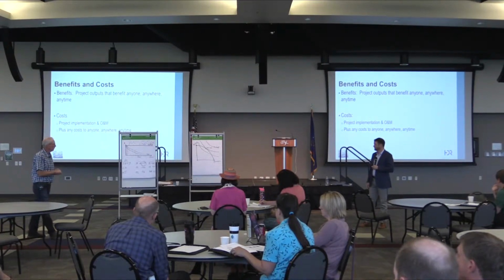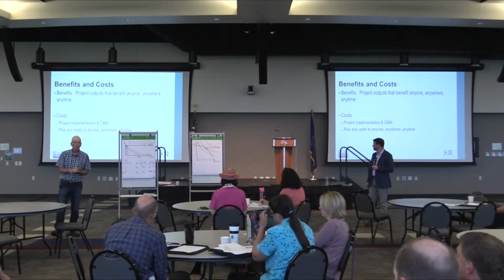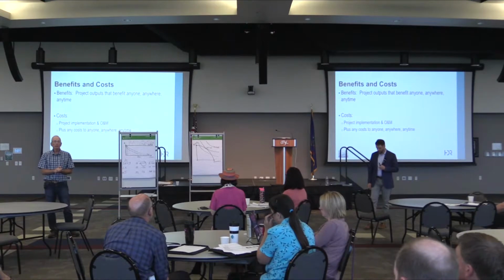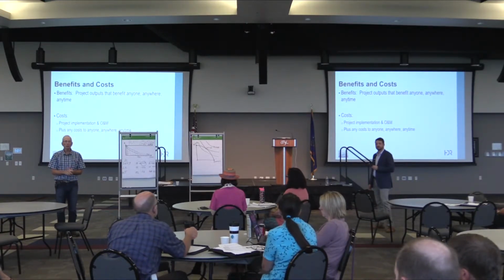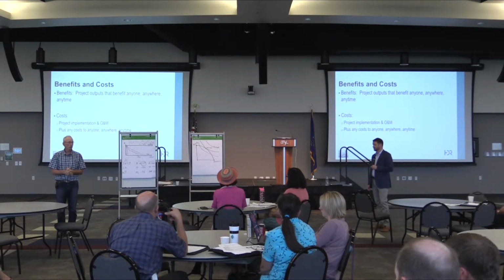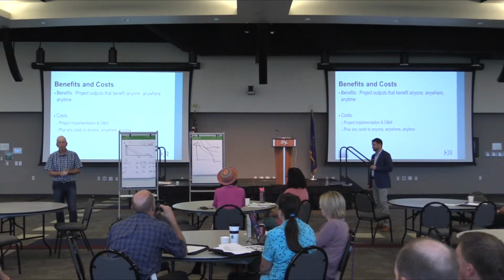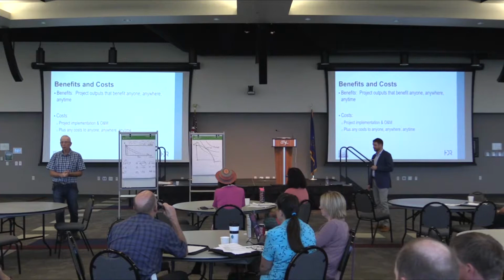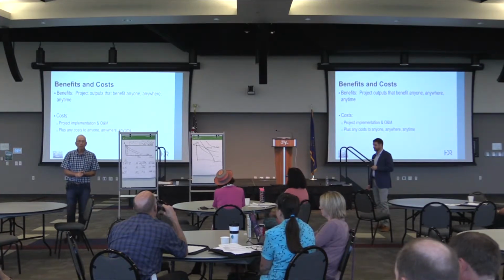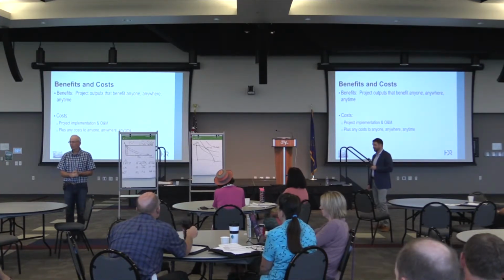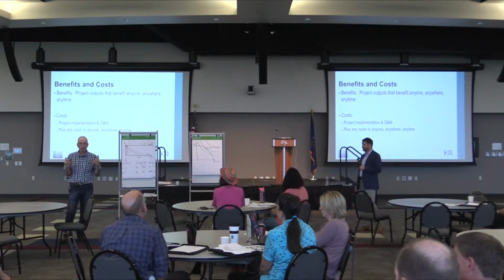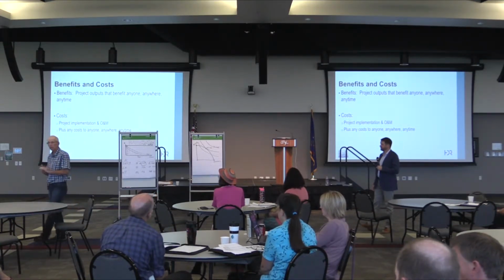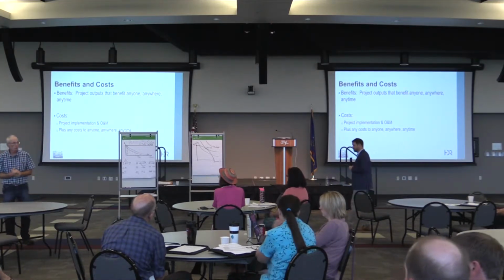Okay, we already talked about project outputs that benefit anyone, anywhere, anytime. And the same with costs. Project costs for economic analysis, the original implementation and all that, involves the design, the legal fees, O&M, the costs over time, plus any cost to anyone, anywhere, anytime. In public sector analysis, you dig and dig and dig, and you find every possible benefit and cost that you can to include in the analysis.